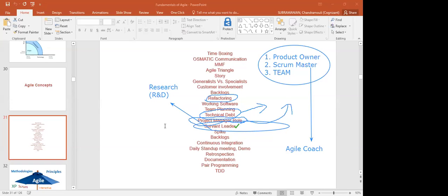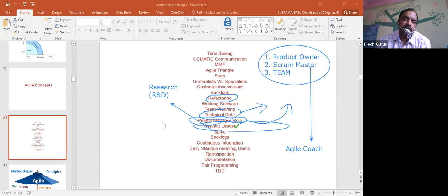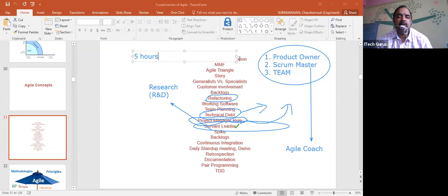Now, please understand, number one is the research, number two is the spike. Of course, another one is refactoring, technical debt also getting done. Got it what I'm saying? So that 5 or 6 hours is only for adding the functionality. The remaining 2 or 3 hours we are spending for the R&D work or technical debt or strengthening the code. So if I plan for only 5 hours per resource per project, that 5 hours is only for what kind of work? Only addition. If you remember, Agile is both iterative and incremental, right? Yes. The incremental work is 5 hours.